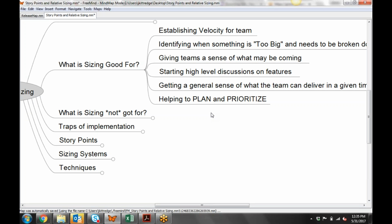So if you had, let's say, some sort of a value metric, right? So like on a scale of 1 to 100, how important is this versus that, you could take this list and prioritize it. You take those items, you have the team estimate with sizing. And you basically can do a very simple arithmetic equation. You take the value, divide it by the level of effort, come up with a ratio. And if you order things based off of that ratio, you know that you're always working in the order of greatest return on investment. So this is a valuable tool for that because something like StoryPoint gives you a tool by which you can determine the relative estimate and basically use that for priority purposes. So in that sense, StoryPoints are important for that.